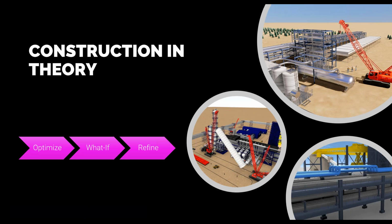And that's really where digital solutions come in. So the sequence matters, investing in getting it right matters. Anybody who's tried to do this in a Gantt chart, I mean, yes, you can, but it's really difficult to identify out of sequence work. And this is where 4D planning creates a lot of value. So teams can view the work before they do the work and ultimately get that sequence right.